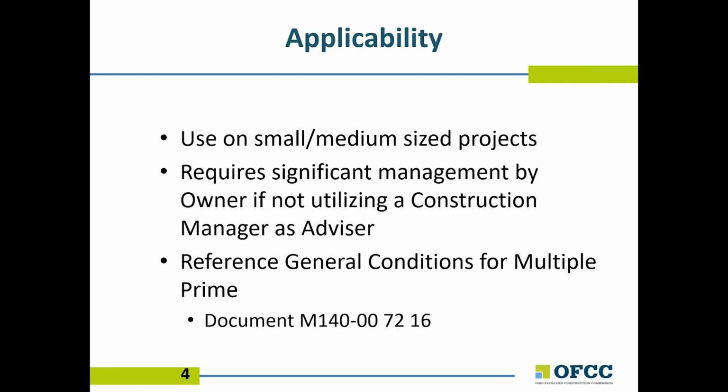Multiple prime is most applicable for small to medium-sized projects with low complexity and not required to be fast-tracked in terms of schedule. This method requires a significant amount of management by the owner, which can be supported by using construction manager as advisor. You may reference the general conditions for multiple prime on OFCC's website, document number M140-007216.